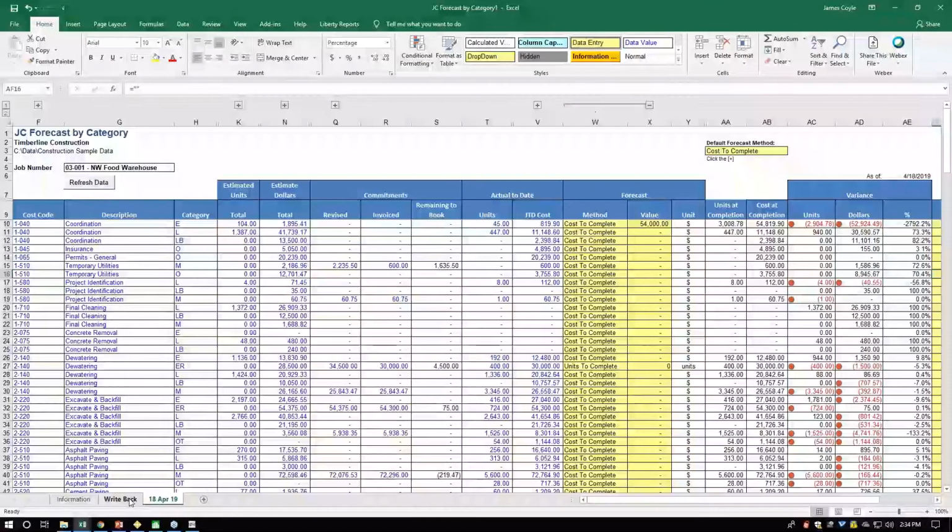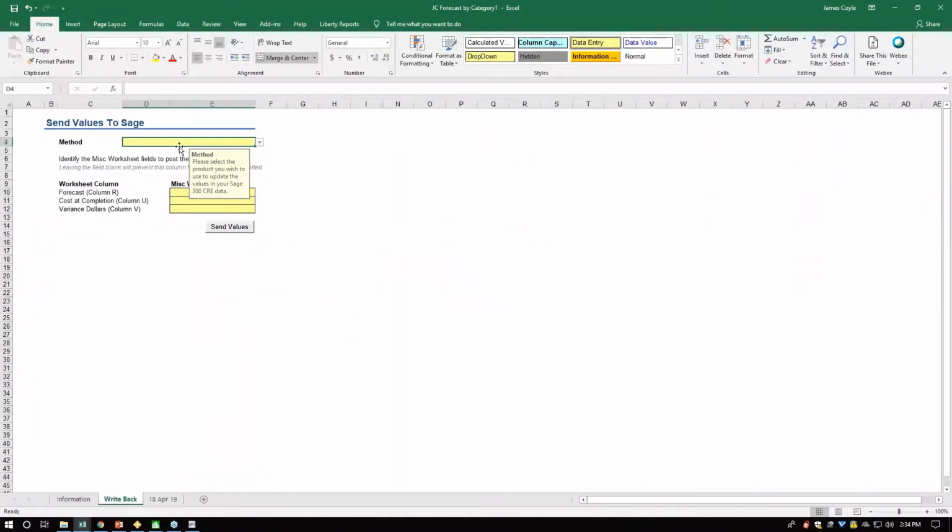And another reason is there's a kind of company that really wants this information in your accounting. It's surety and bonding companies. They want to know that your progress backs up your WIP reports, that you just didn't pull numbers out of the air. And when they see this kind of backup, I present this kind of thing at the construction financial managers conferences, and they love it. Bonding companies are like, oh my, that's amazing.